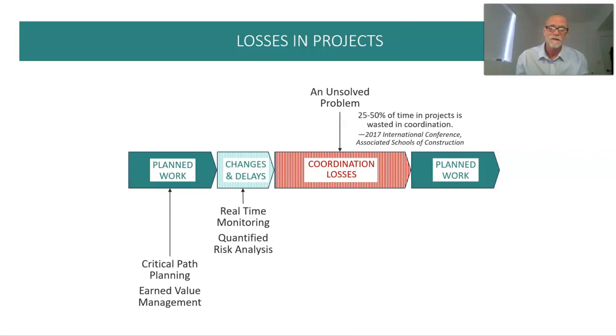In fact, there are some studies that say somewhere between 20 and 50% of time in projects is wasted or lost on these coordination losses, whereas on the changes and delays, it's estimated maybe 10 or 15%. So a real opportunity is to focus on reducing these coordination losses.